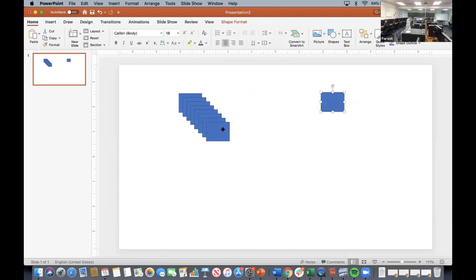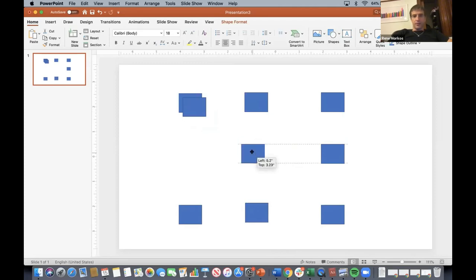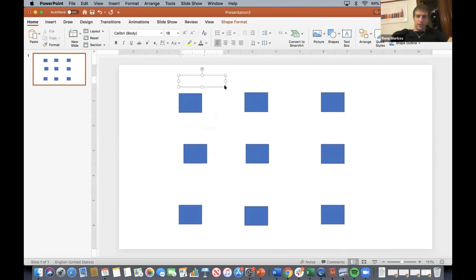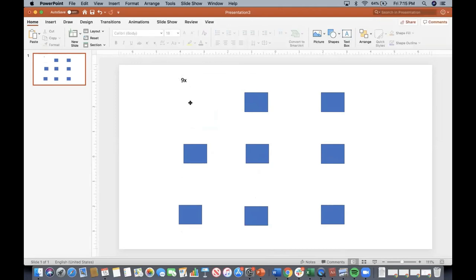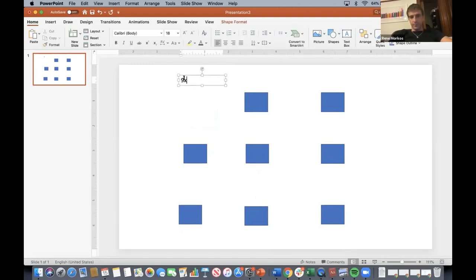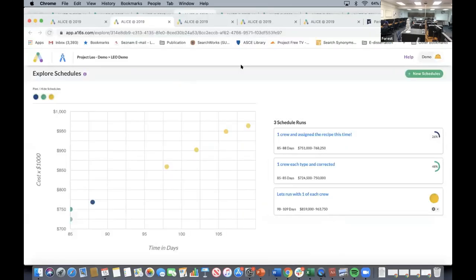Basically, you've got 9 columns, right? You want to schedule them. So which column can you do first? You've got 9 choices, right? So you've got 9 choices for the first one. Let's say you pick this guy. How many choices do you have for the second column? 8. How many choices for the third column? 7. There you go. So 7, et cetera, et cetera. So that's 9 factorial. That's how you write it. And so 9 factorial is actually equal to.